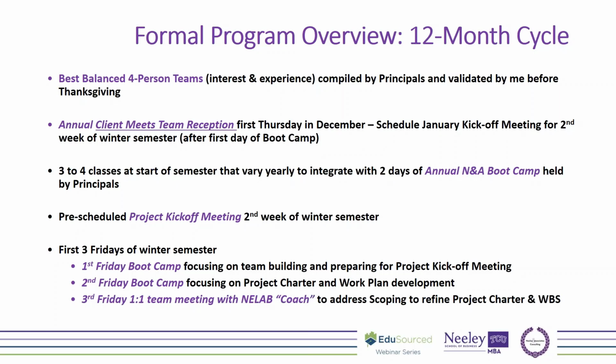So we looked at various ways to take out some content that we had, but move some of that content delivery, in essence, to the principals who meet with them weekly, but then also up the hours to provide more value to the client. And as I said, it's 350 hours, and you can break it down. It roughly comes to, in an ideal world, 7 to 8 hours per week per student.